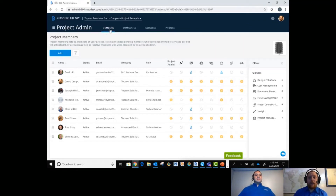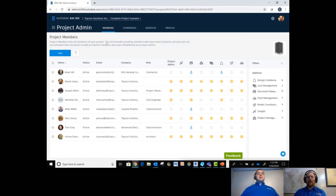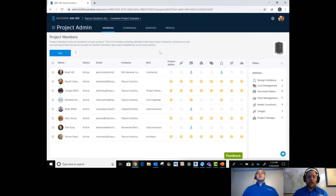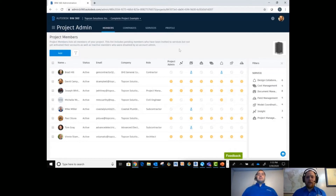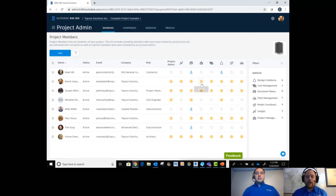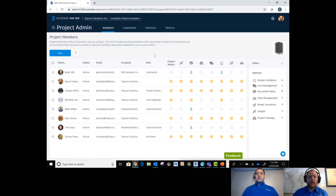Going off from the account admin and the members portal: the account admin, like Joey said, is that repository — that database. You're going to invite all the members you want to collaborate with, as well as internal members, to pull in and collaborate with on these different projects. From that database you're going to add in your project members who are explicitly involved in this project and grant them access to the different modules of BIM 360 as needed per project. Each project is different based on what it needs, and you activate those services on an as-needed basis.